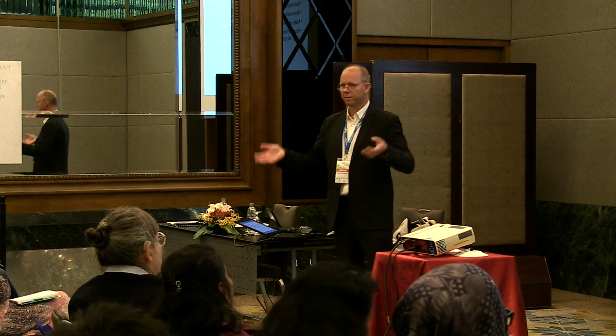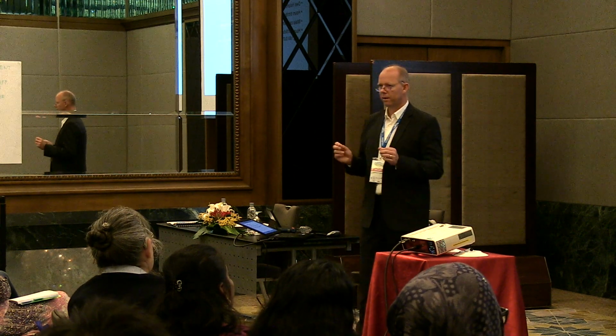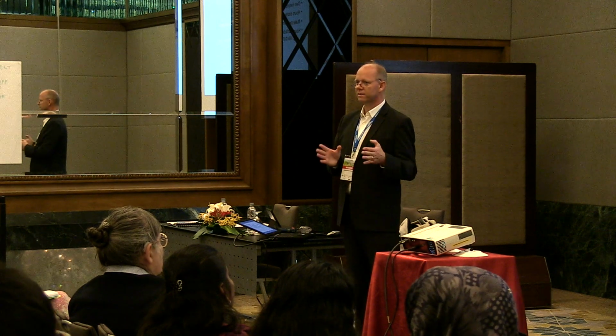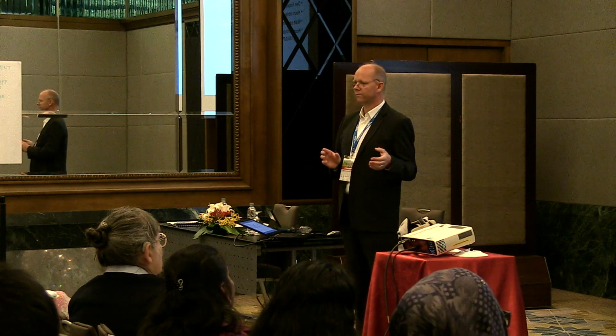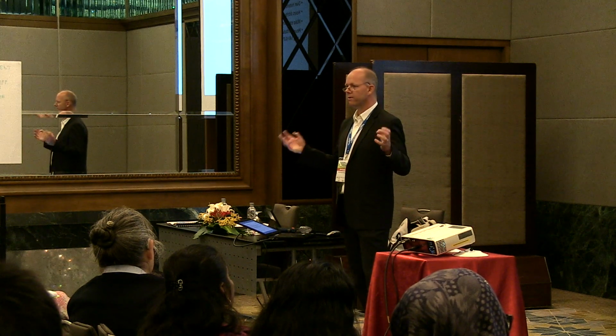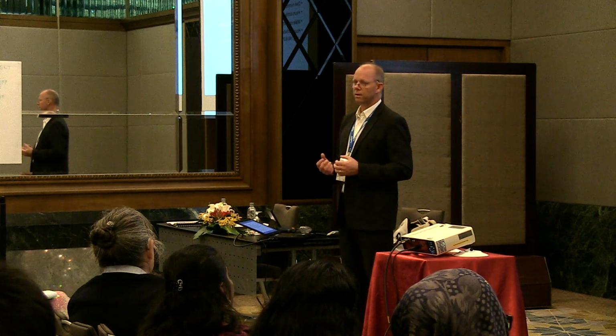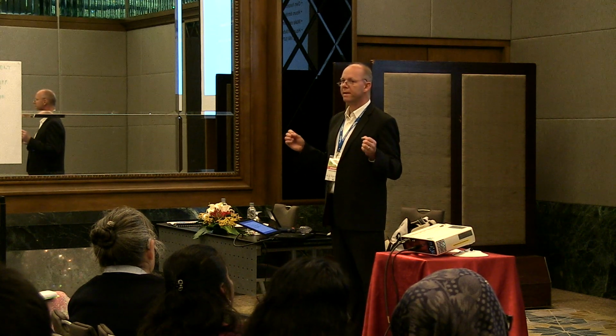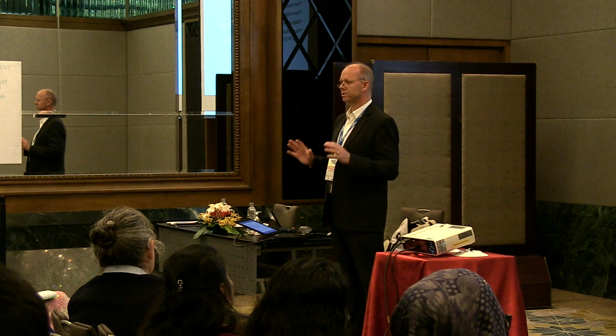So if you take the time in your organization to pick out a few exemplary projects, count the size of those, and you have the financial figures of how much time it cost to develop those, then you have the start of your own historical database inside your organization. That will be immensely powerful when you are estimating forward.